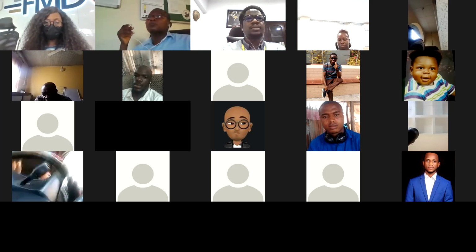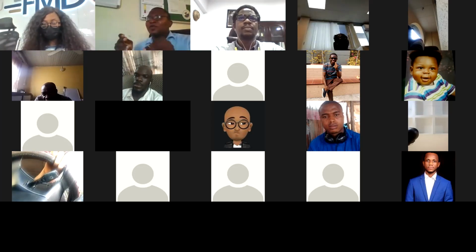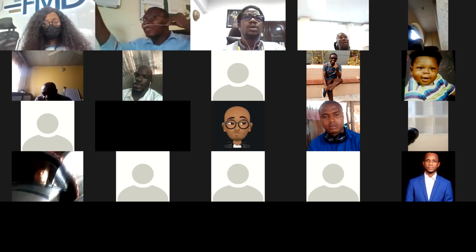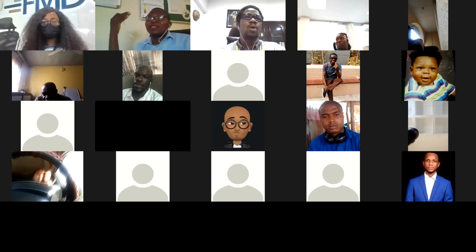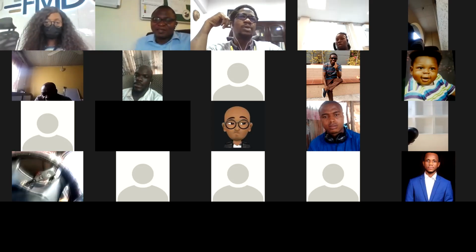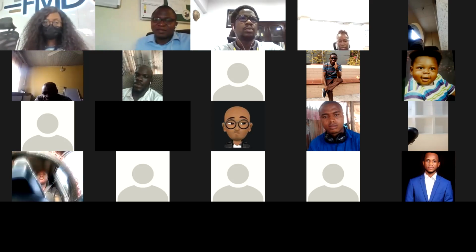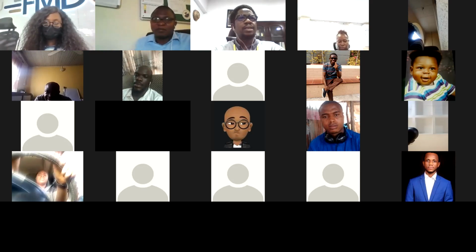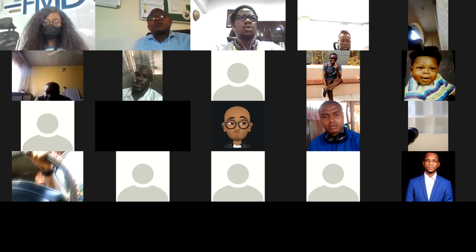Now, if the bids are coming in one by one and you receive the first bid, you checked, 600,000 naira. When the next bid comes in, 650,000 naira. You now remember that you had a friend who is interested in this job. You want him to also bid. You call him: please, this is the job we want to do. Make sure you don't bid up to 650. The lowest so far is 650. What are you doing? It's fraud. If he bids 649 to win the job, you have deceitfully removed competition and given him an unfair advantage.